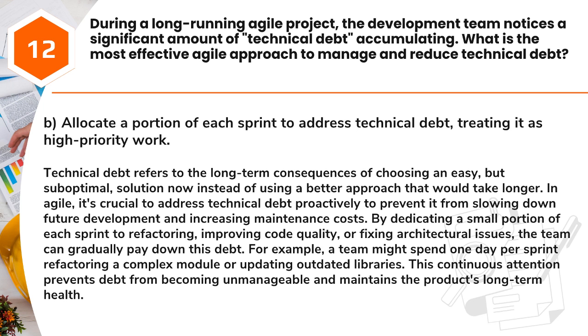Answer: B. Allocate a portion of each sprint to address technical debt, treating it as high-priority work. Technical debt refers to the long-term consequences of choosing an easy, but suboptimal, solution now instead of using a better approach that would take longer.